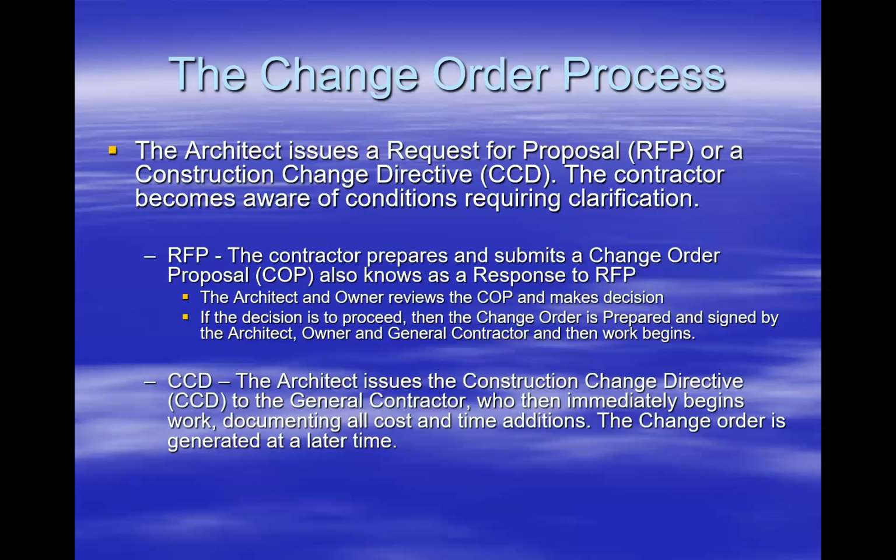You know, one thing I just remembered that I didn't say when we were talking about claims is, under the A201, the general contractor has 21 days to make that claim. So you need to make sure that if you are making claims and stuff, don't procrastinate those. Make sure you get those documented and make those claims.